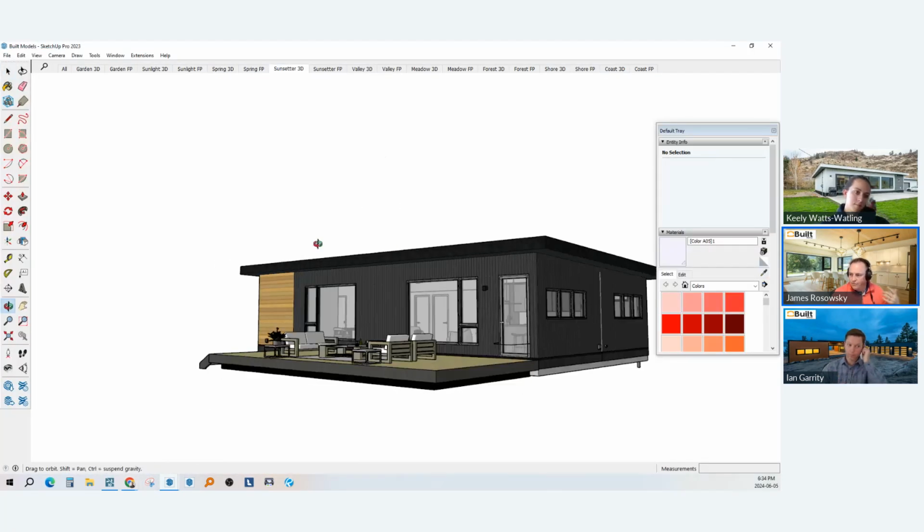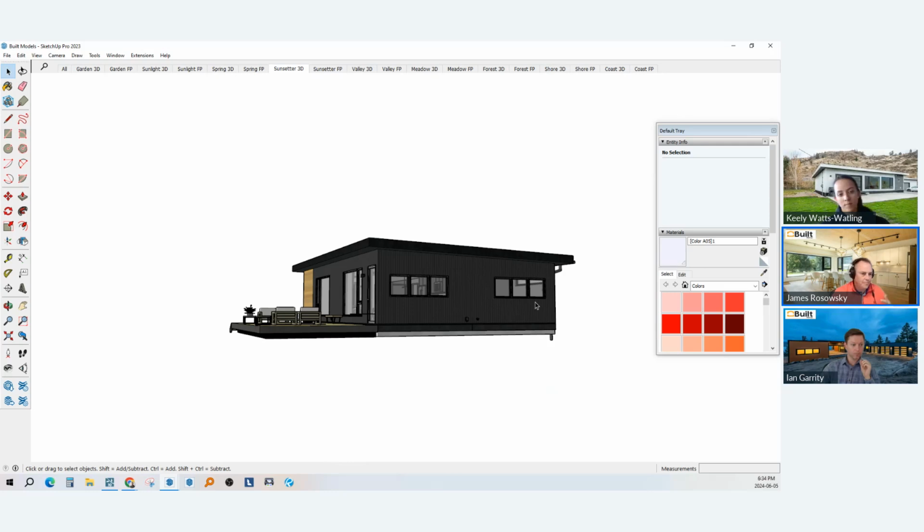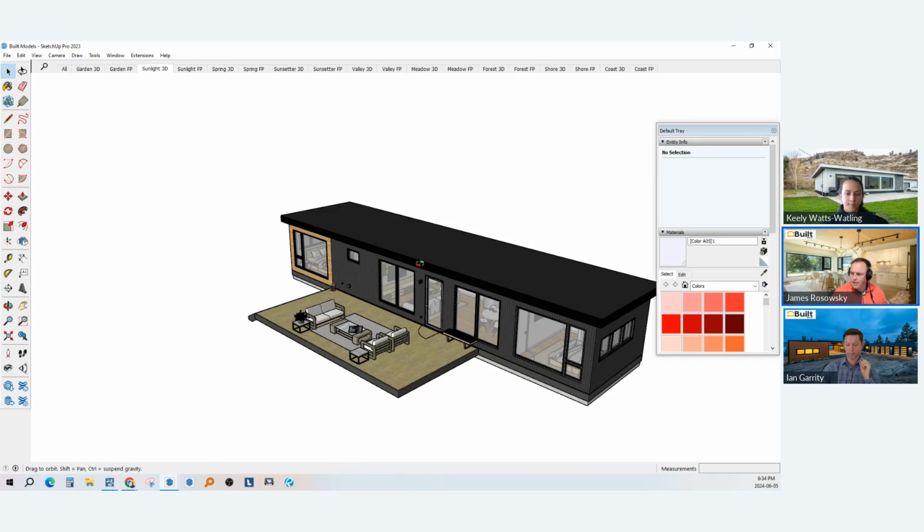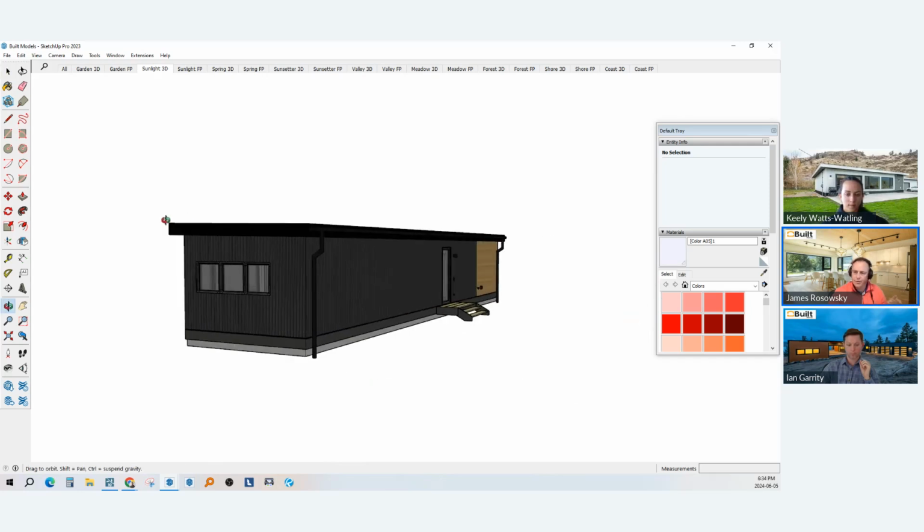So I guess this is a 14.5, two of them. When you get into the 16-foot wide units, which would be something like this Sunlight, you need a lot more trucks. Well, actually, this one's done at 14.5, but on our site, you'll find ones that are 16 wide. And the deal is that the wider it gets, the more pilot vehicles you require. So it just costs more money.